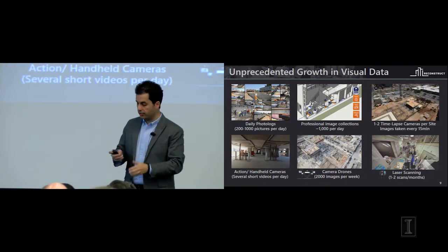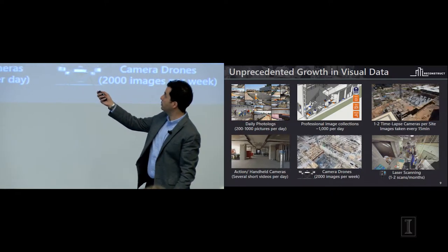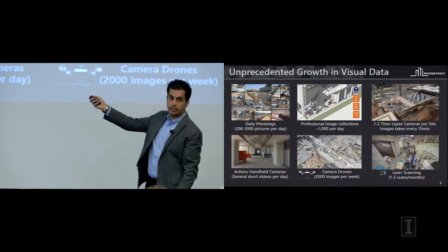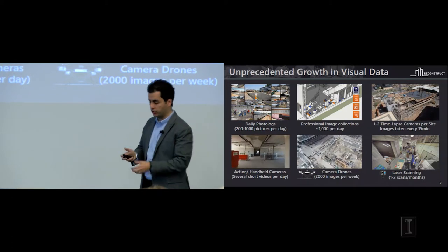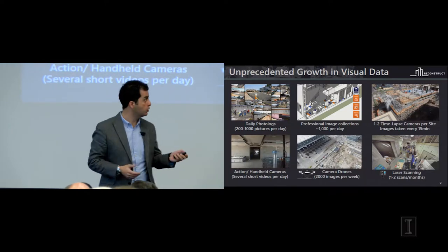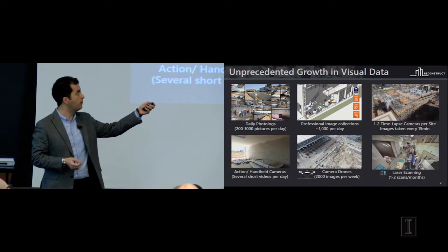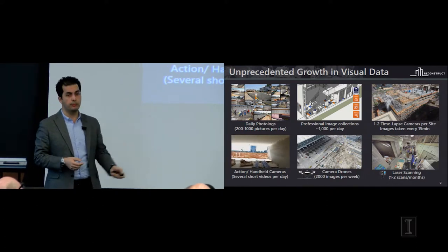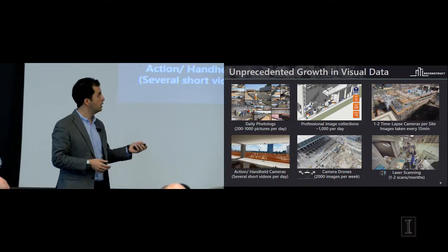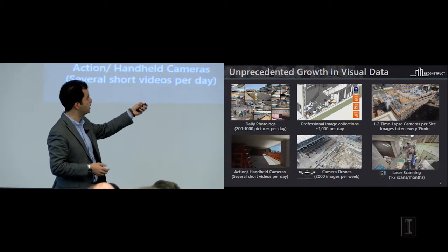Pictures that subcontractors capture. So you walk around the job site, you look into the site, from a quality perspective, from a progress perspective, from a productivity perspective, you take pictures. Typically we have somewhere between 200 to 1,000 photos usually captured. On the larger job sites, we bring in other companies, they walk around the job site, they perform professional photography. Within 24 hours, they come back and they actually show us where images are captured with respect to a model.